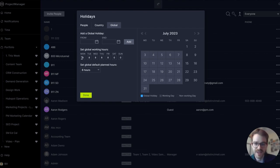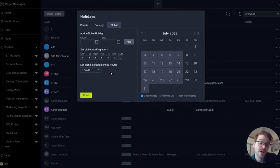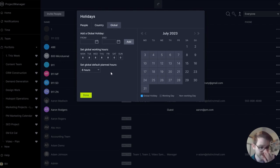In the global tab you can set global working hours for your team. You can see that this company has global working hours of eight hours Monday through Friday. If I'm making long-term plans and need to make estimations on resources, I'm going to set my global default planned hours to eight to match my typical global working hours — that'll help me track baselines and things like that.